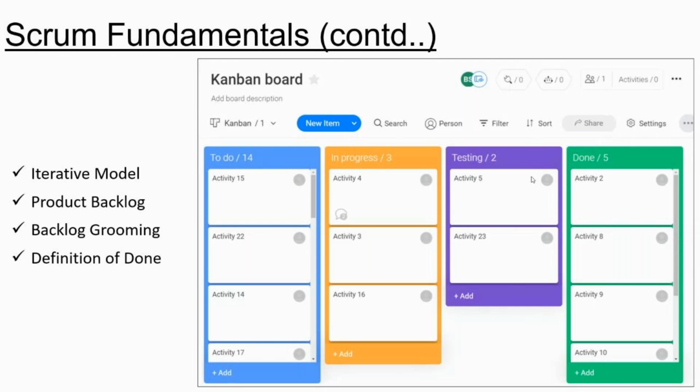Okay, so it becomes the responsibility of the scrum master to make sure that whatever blockage is there due to any reason, that has to be resolved. And once that is done, then it goes back to in progress again, redeveloped by the developer, then pushed into testing. And then when it is done, it comes into done state. So this is the typical approach which is used in most of the agile projects. Okay, so I hope we are clear with all of these things.